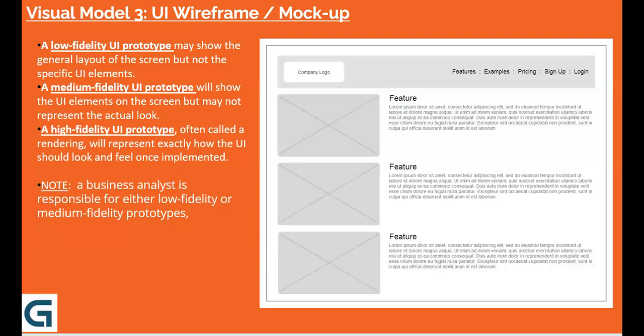The same thing you are going to provide, but whether you have understood their requirement or not, you are going to document and give it back, telling them, hey, we have understood this point. You can confirm if we are right or wrong. And the customer will have a certain timeline within which they have to come back. In case they are not coming back, it means they are in agreement with you and they are busy with something else. So the solution is mapped to what the customer has asked you to do.